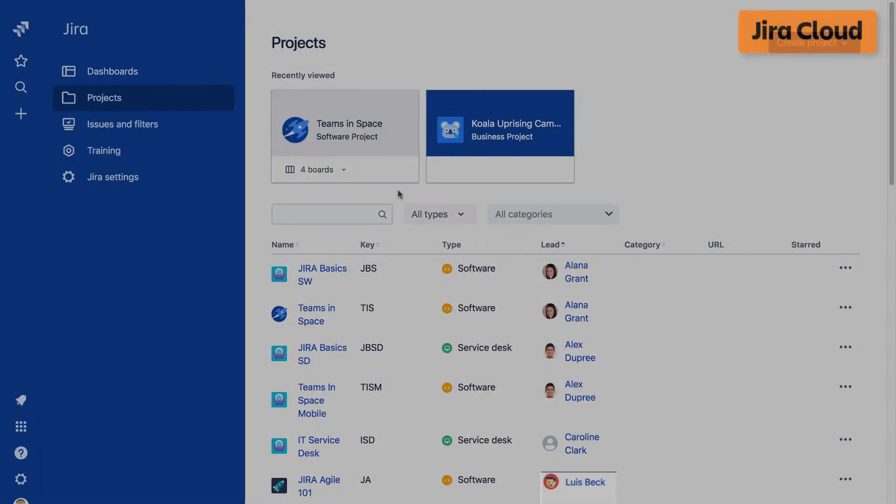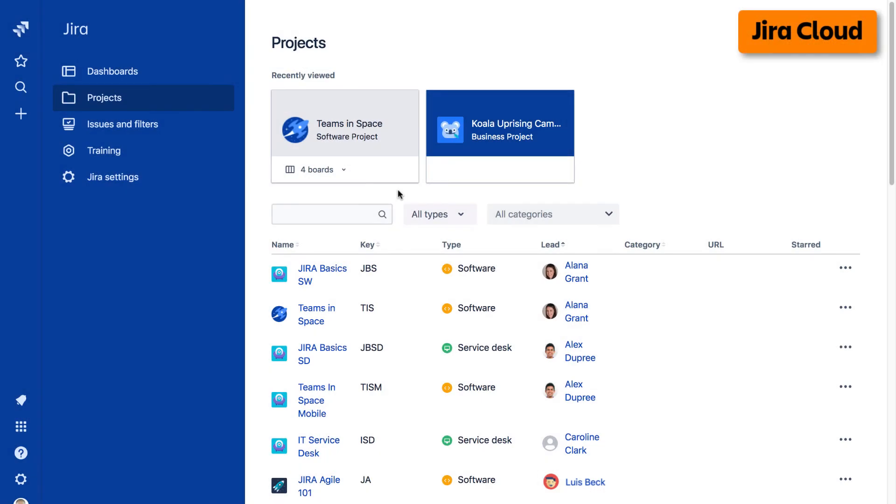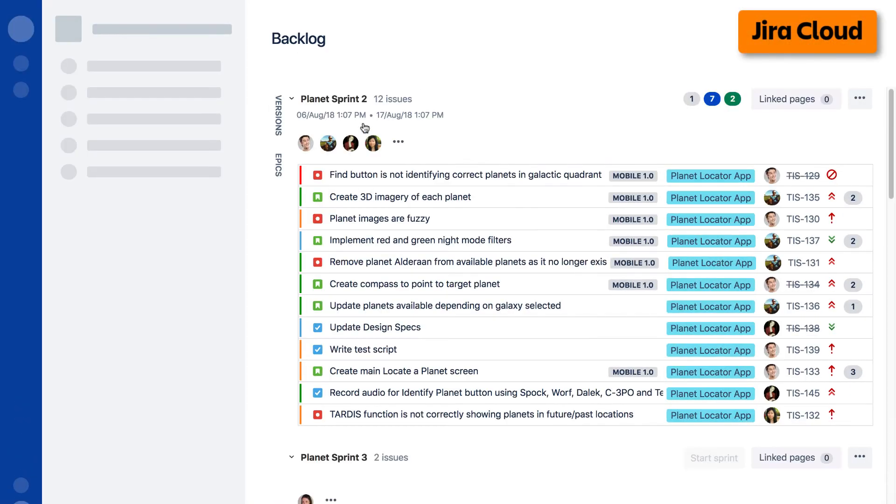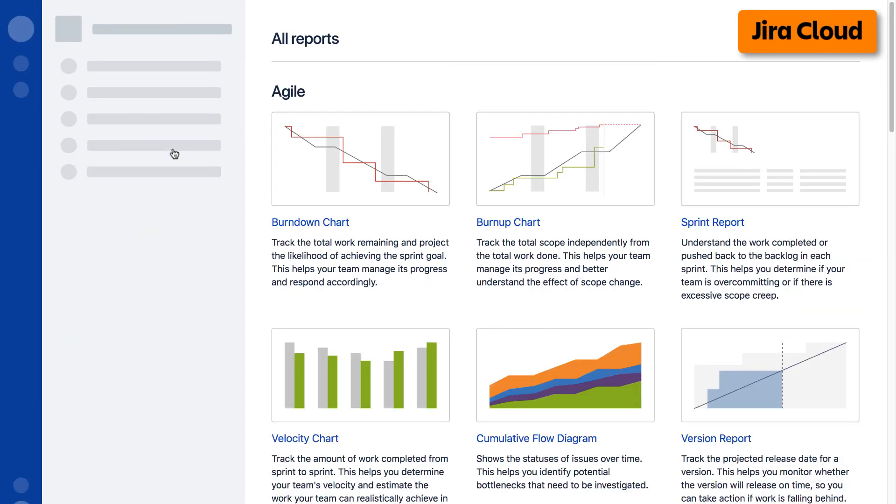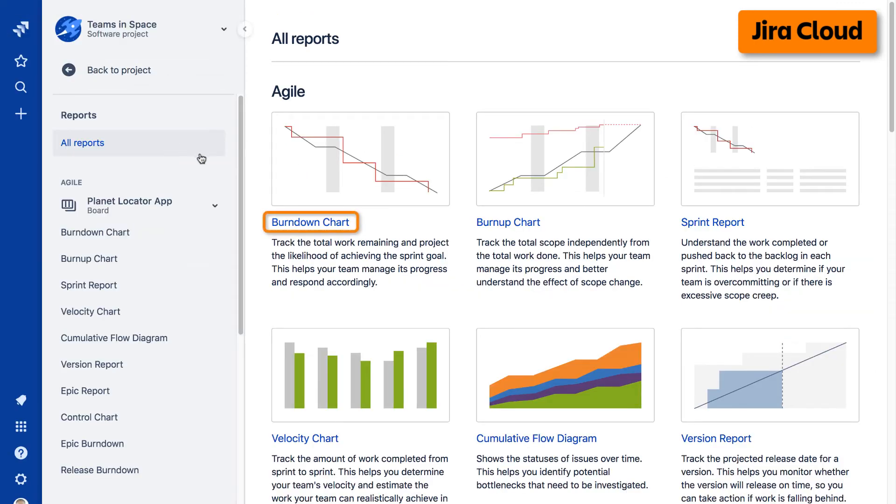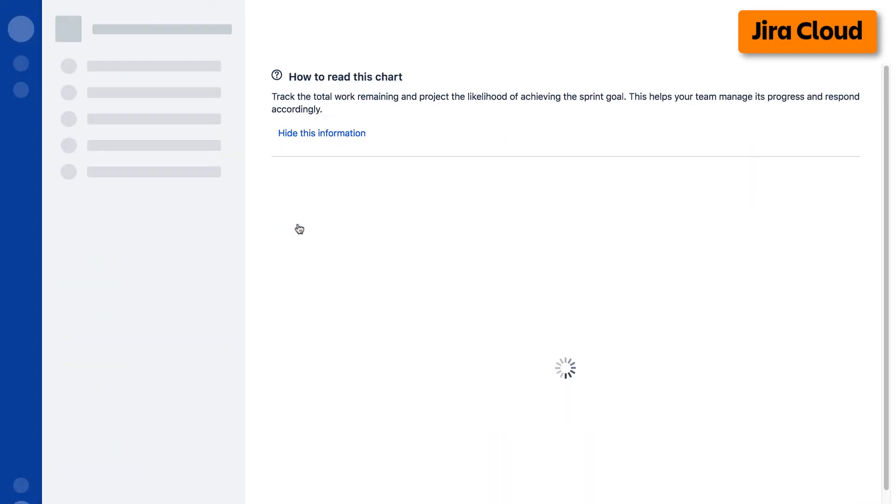To access reports on the cloud version of Jira, navigate to your desired project, select reports from the left taskbar, then select the desired report from the Agile Reports display.